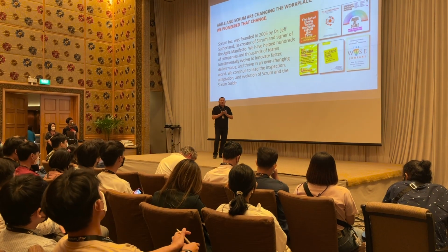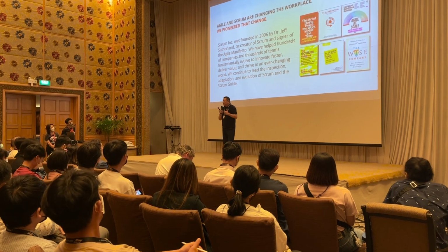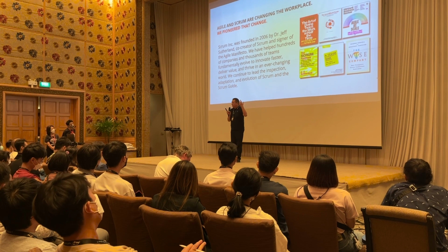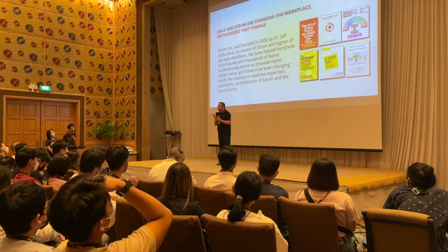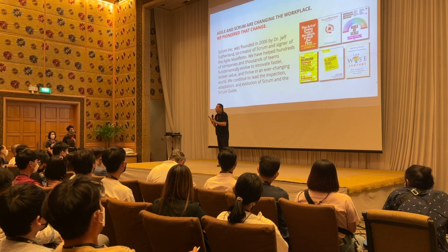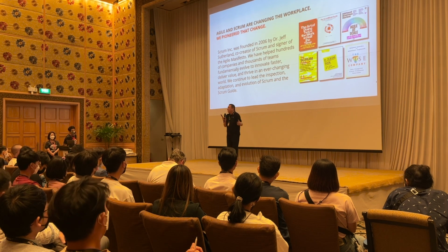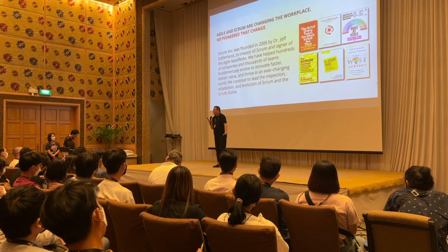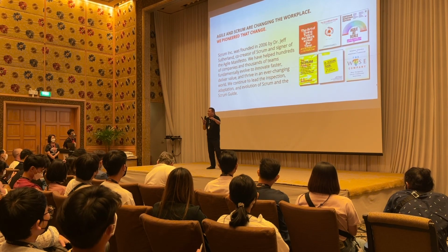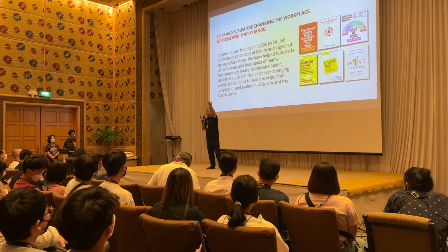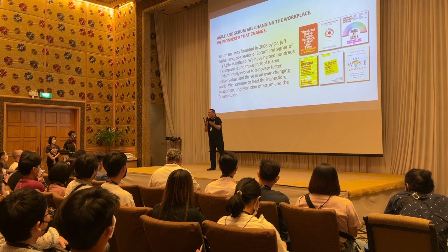Right? To learn Scrum@Scale, you only need to know Scrum, because every team in the organization, including the bosses, will be Scrum teams. There are no other roles like the RTE or any overhead that you need to incur in your system. All you need to do is use back the product owner, the Scrum Master, everything that you know about Scrum. So the Scrum teams have their product backlog, the management has their backlog. It's a product backlog. You use back the same rules.